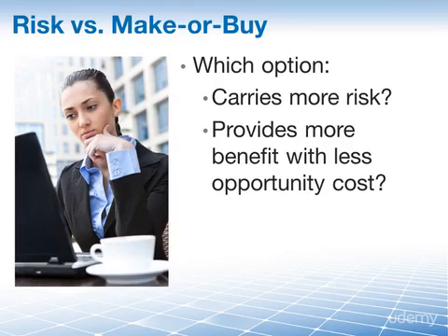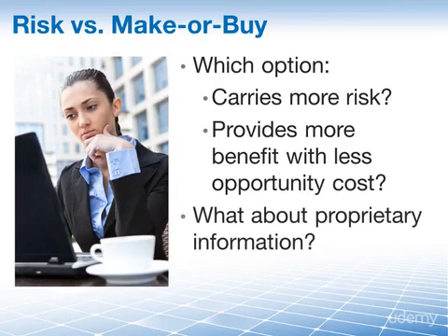You'd also have to assess the importance of proprietary information as you appraise your risks during the make or buy decision. For example, if the project is using a top-secret innovative technology in a very competitive field, then you may not want to go outside of your organization. If you do, you may have to consider very tight non-disclosure agreements. So you see, there is quite a range of choices and decisions to be made when you plan procurement management.